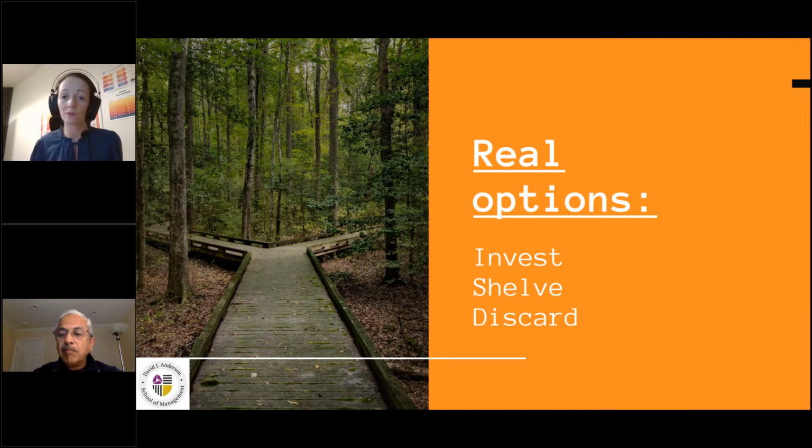And the fourth one is the option to redeploy, which means that you know this investment doesn't make sense, it brings losses to you, but you have already invested in it, and, say, created an MVP, you made some prototypes, you made some testing, and you can use what you have already created. So for that, first, all of the cost that you already carried is a sunk cost, and you need to write it off. But what you have built, you redeploy in another investment, in another project, and this way it may become the option to expand for this other investment.